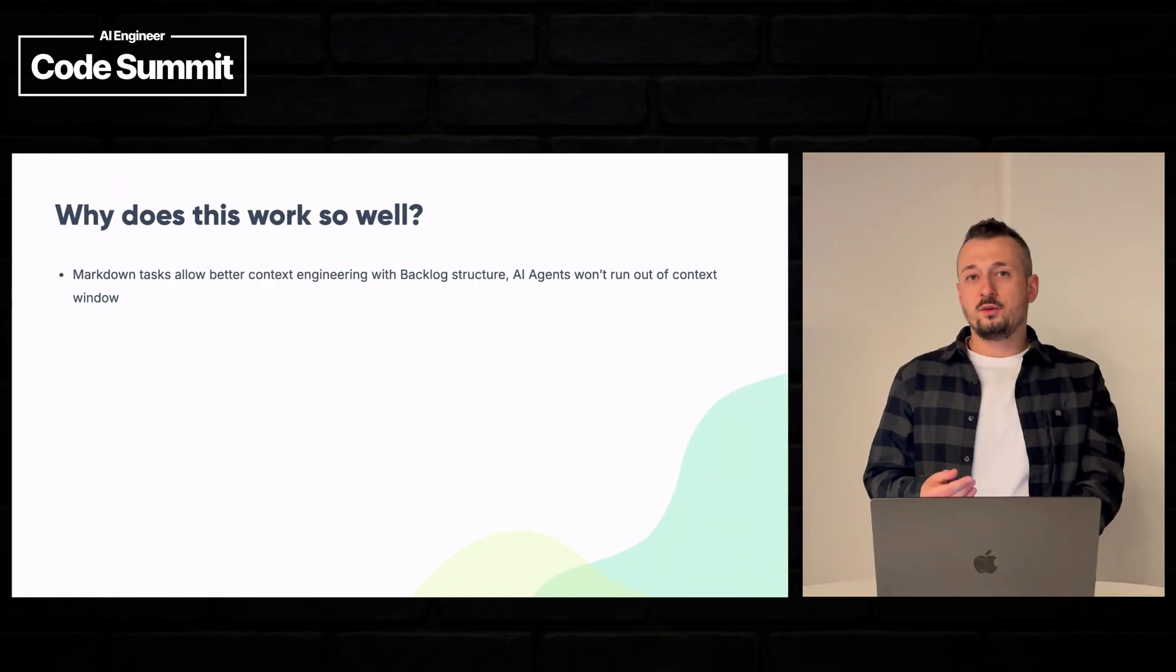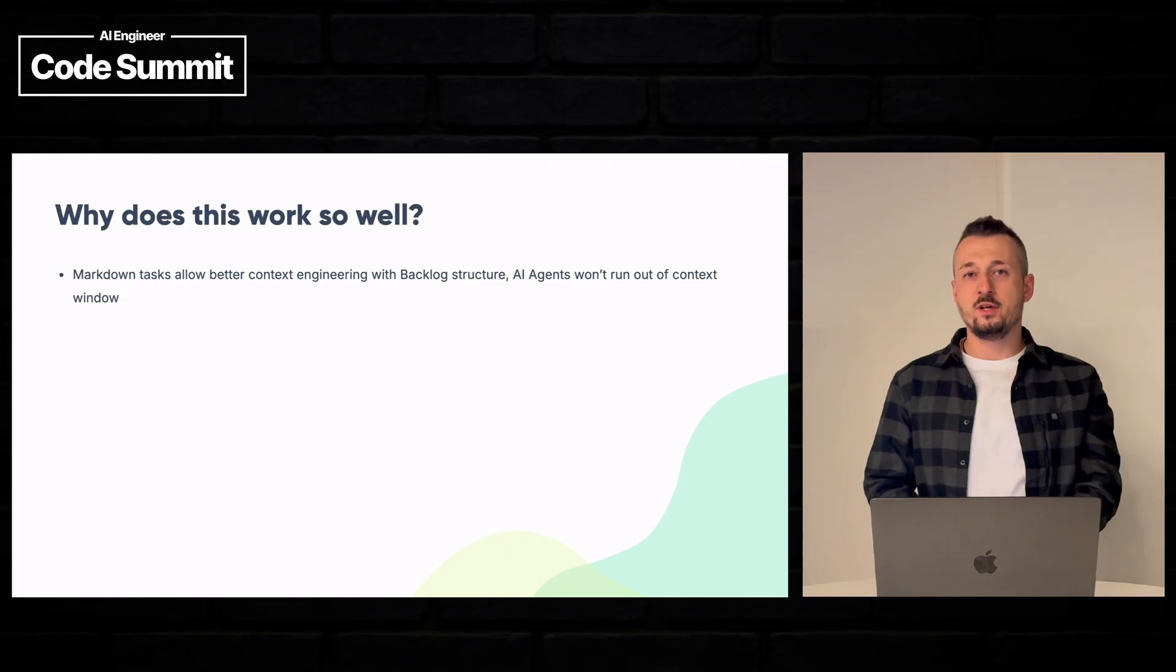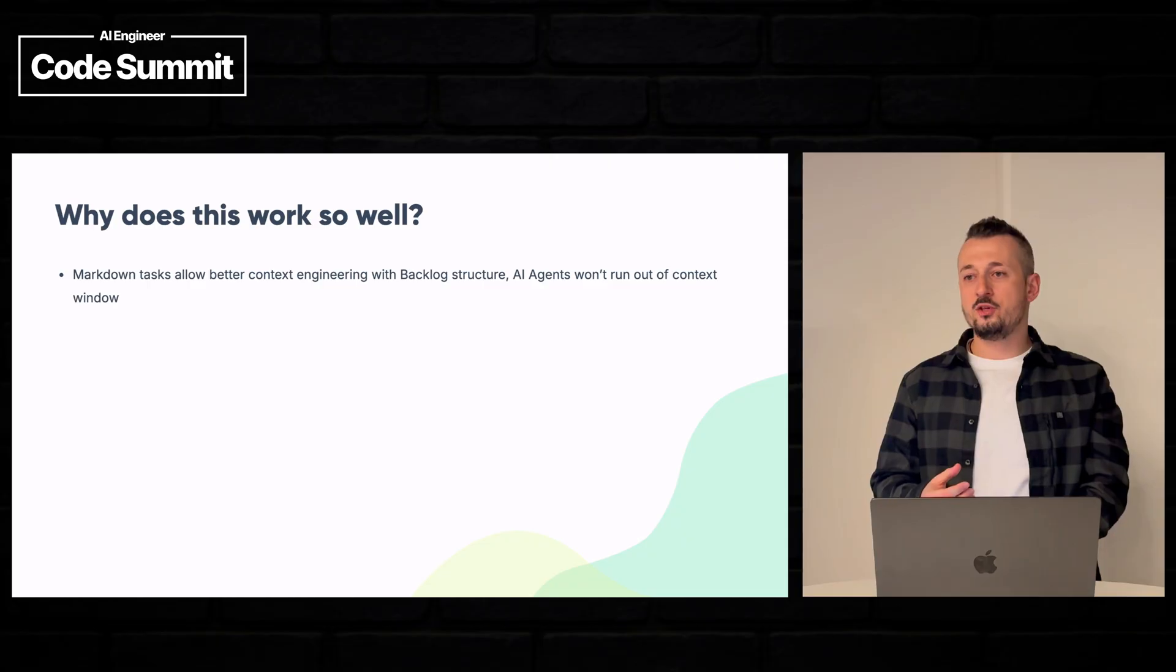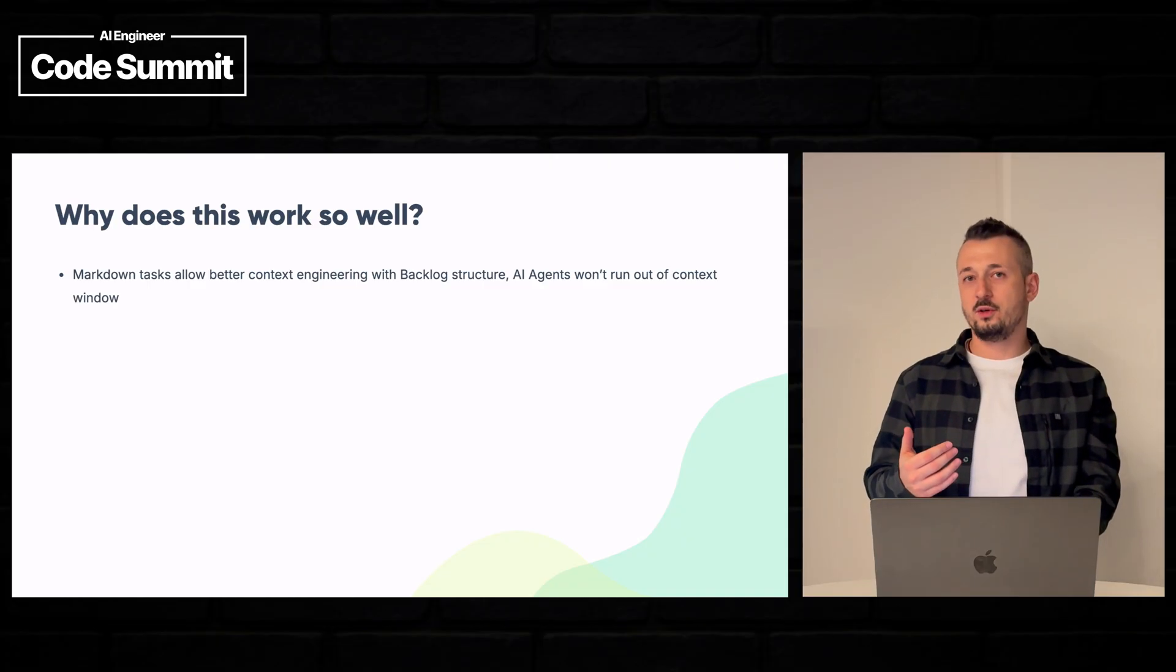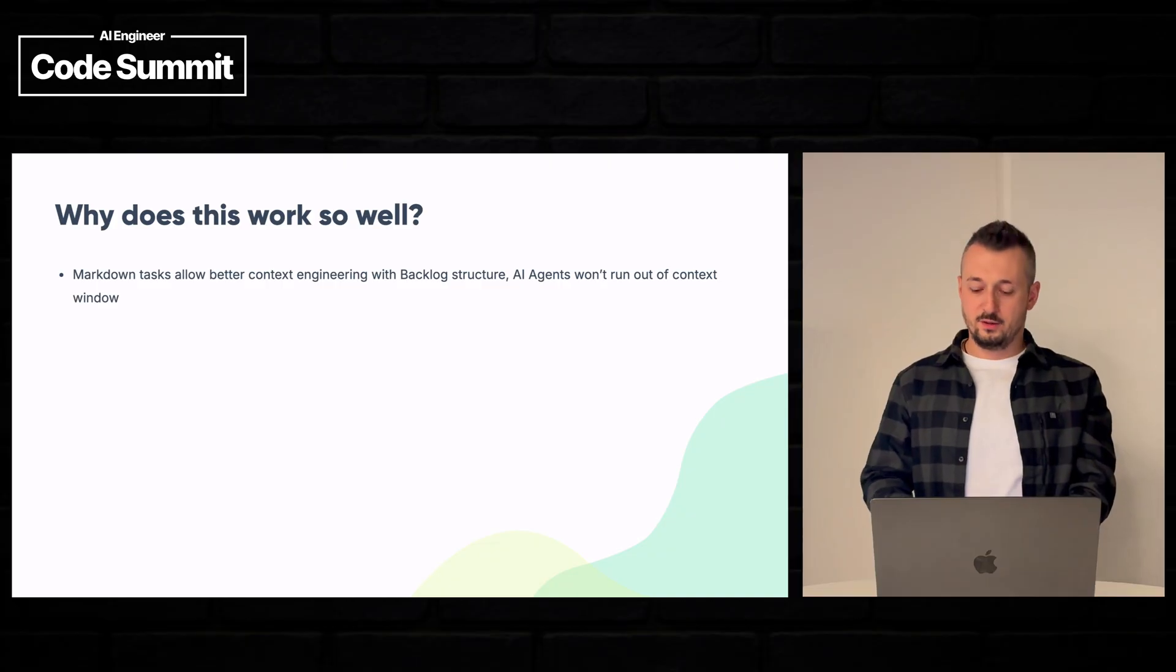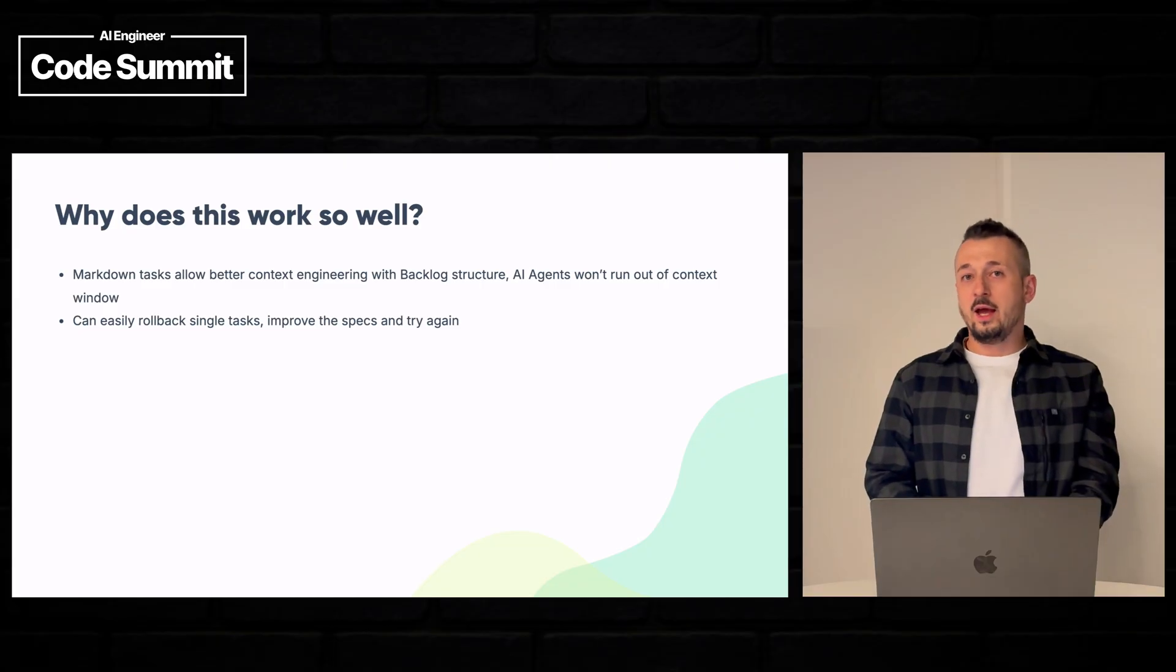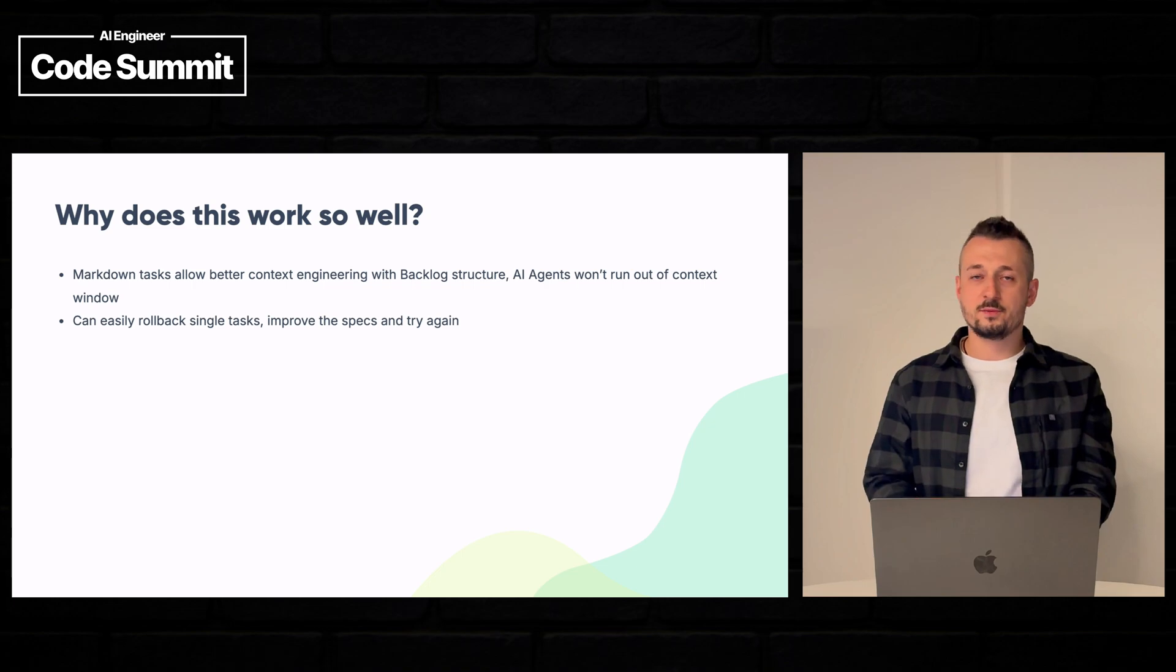Having markdown tasks stored in your repo allows you to do a sort of context engineering, which means you can define how much an AI agent should implement within a single task so that he doesn't run out of their context window and you know exactly what will be implemented. And they don't implement extra features that are not wanted.